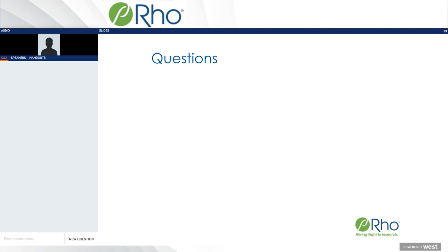Okay, thank you. So in the acute pain studies, they go so quickly. The subjects are at the site for 2-3 days consecutively. The amount of startup time that it takes for an ePro system to be put in place, and a lot of money and resources that go into UAT planning, I don't know that it's completely worth it to do that full ePro system. Paper seems to work very well, especially since everything is well contained at the site. When you start talking about subject diaries that they are leaving with, that might lend to considering ePro. So you need to think about the design of your study, the outcomes you're collecting, and how much control you have over those while the subject is on site, or if they are taking it away, and how much control you want to put around that as well.